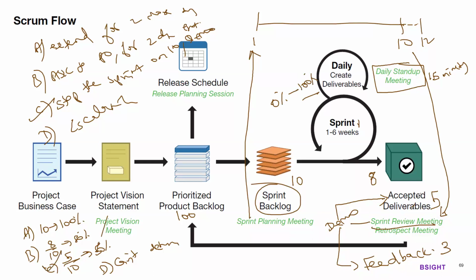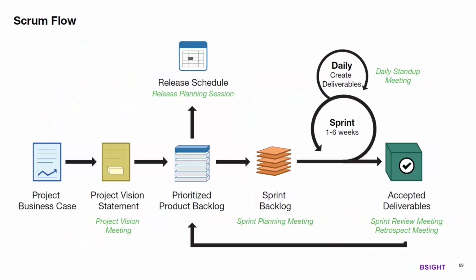Sprint review meeting will usually be 2 hours for a 2-week sprint. After a half hour break, we'll have another meeting called sprint retrospective meeting. This meeting is mainly between team members, to discuss lessons learned from that sprint.